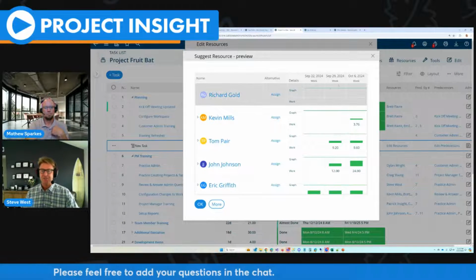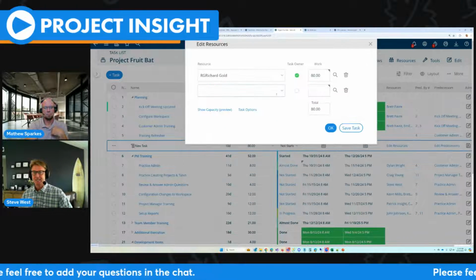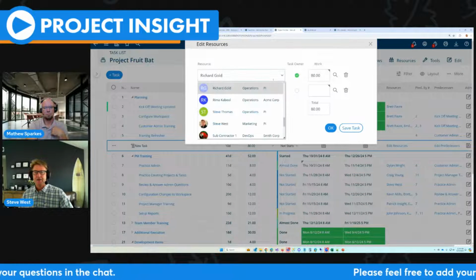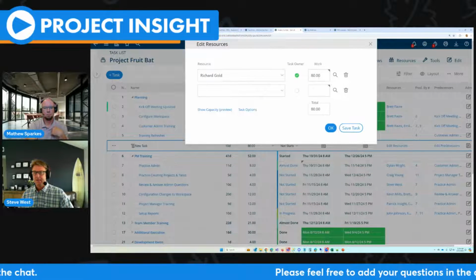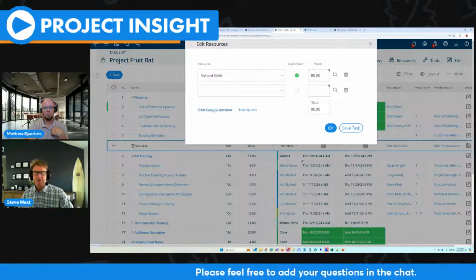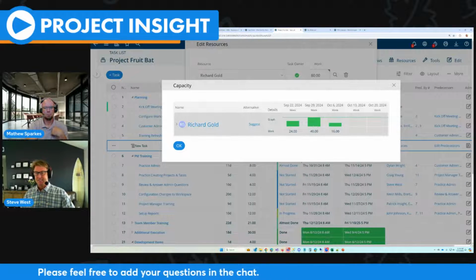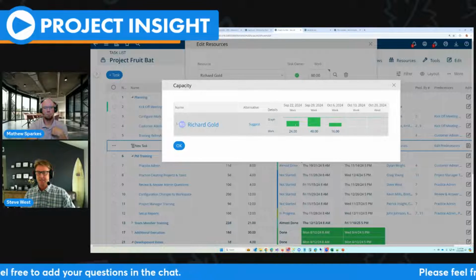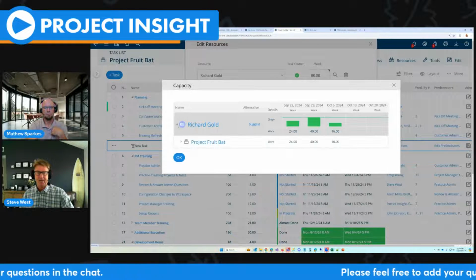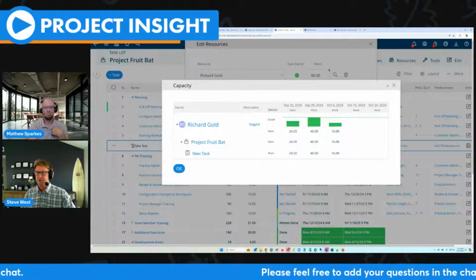So I can see that Richard doesn't have anything. Let me just assign that to him. And now I've got this assigned to Richard Gold, 80 hours. If I want to see the capacity of Richard, I can see that again. Now that he's done this, this is what it's going to do to him. And I can even drill right into other things he might be doing.